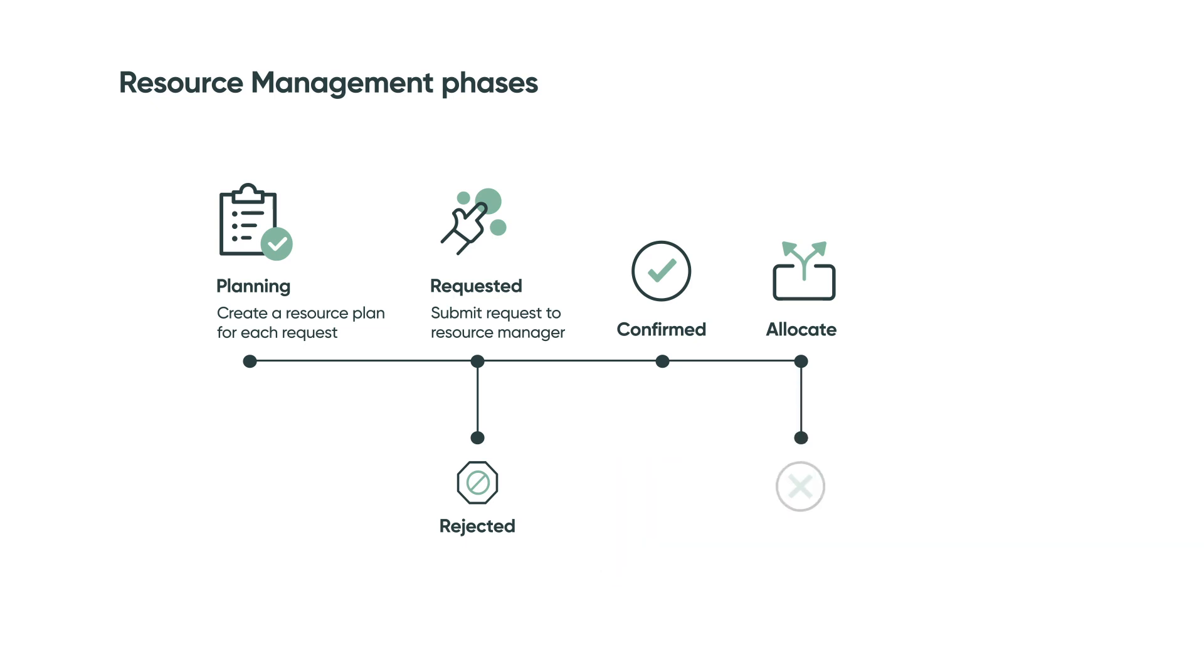We had an unexpected shift in priorities and all existing projects are frozen. The group can no longer work on this project. Once I move the resource plan to canceled, all past and future allocations are released and available for other projects.